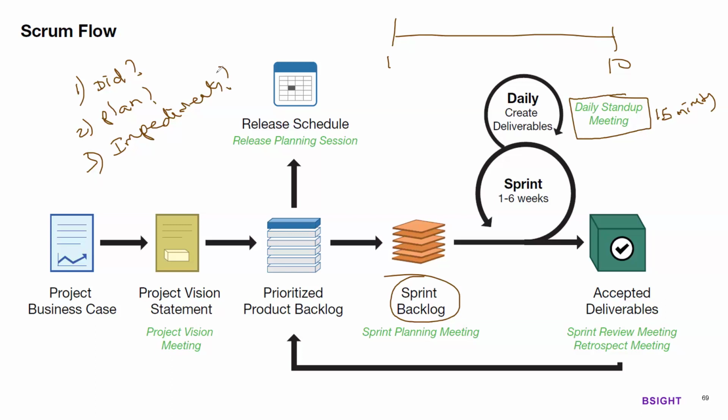This work will continue for a sprint. So on day 1, you will conduct a sprint planning meeting. On day 10, you will conduct a sprint review meeting, covering what you completed in that particular sprint.